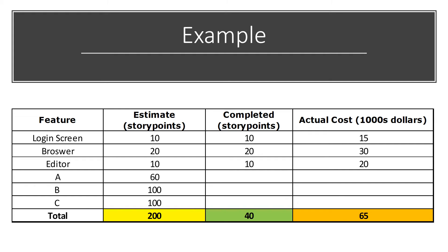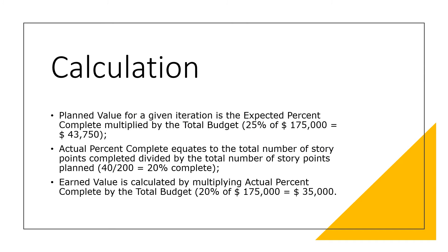Let's see an example to clarify these three concepts. With a total project budget of $175K and having completed one out of four iterations, we have this product backlog and these actuals. With this information, which is easily available in any scrum project, it is easy to calculate our three base values. Expected percent complete equals the number of completed iterations divided by the number of planned iterations. In our example, after iteration 1, we should be at 25% complete. EVM in agile works by comparing the current release plan — taking changes in requirements into account — against the actual work performed. We can see at a glance that our project is in trouble: the earned value is less than the planned value — EV = $35K and PV = $43,750.